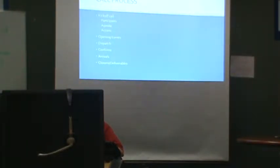This call management section is going to be things you won't necessarily ask. Is there a lead PM, number of PMs needed, number of dispatchers needed, lead dispatcher, number of QA reps needed, which are our confirmed reps, project coordinators I should say. There's quality assurance. PMO coverage shift: some of our projects run at night, and we need a PMO at night, so we put that in here.